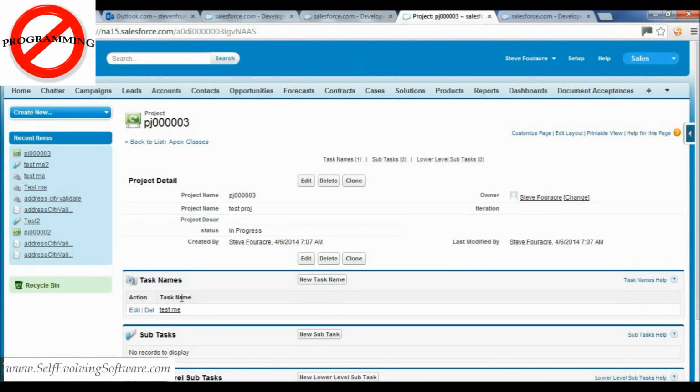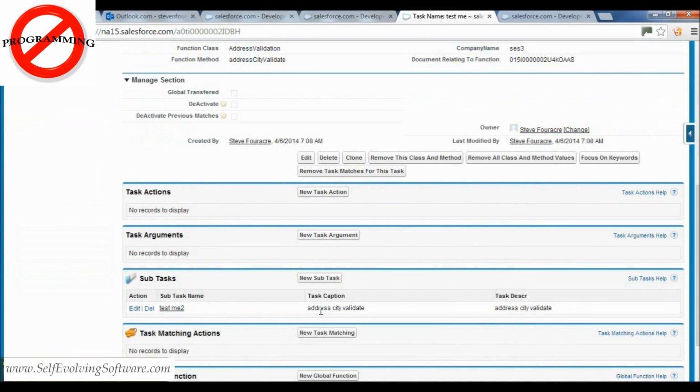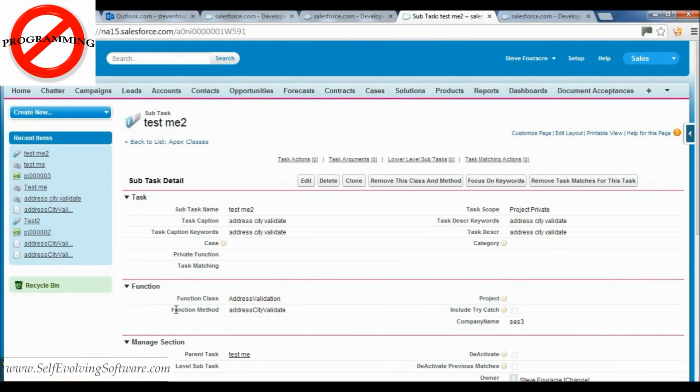Now open your project. Click on your top task and move down the screen. You can now see the new subtask that you created. If you click into that task, you can see that it created the task copied from the existing task, as well as any of the records that it was linked to. Using this, we can quickly build up a large project of tasks from using existing tasks made in other projects.